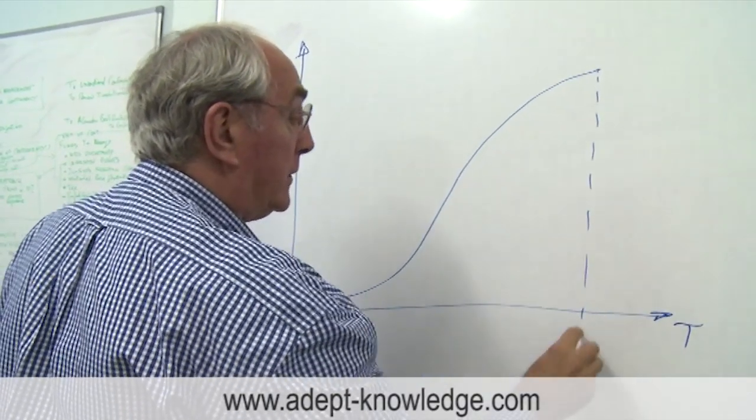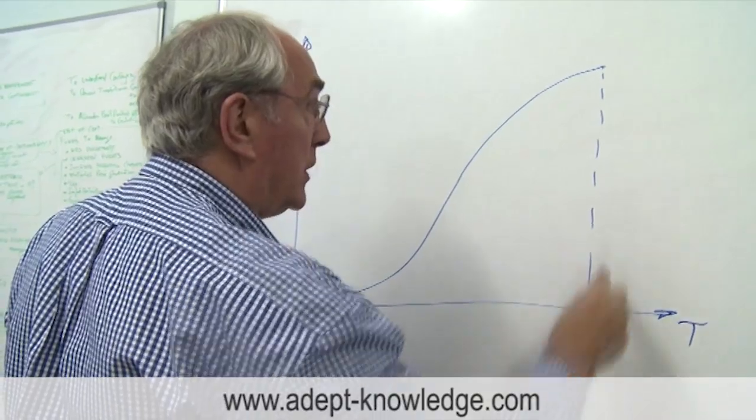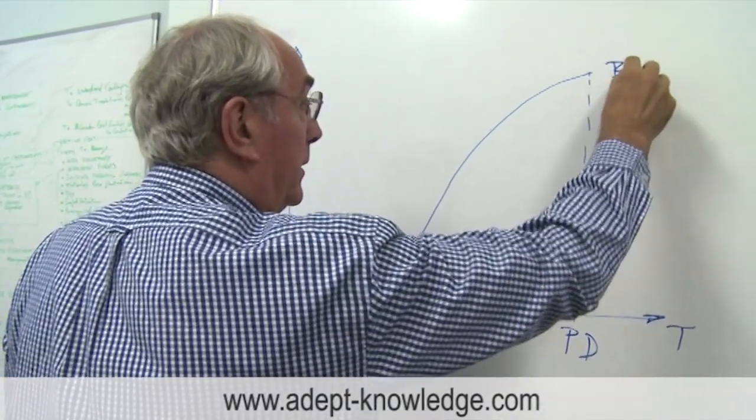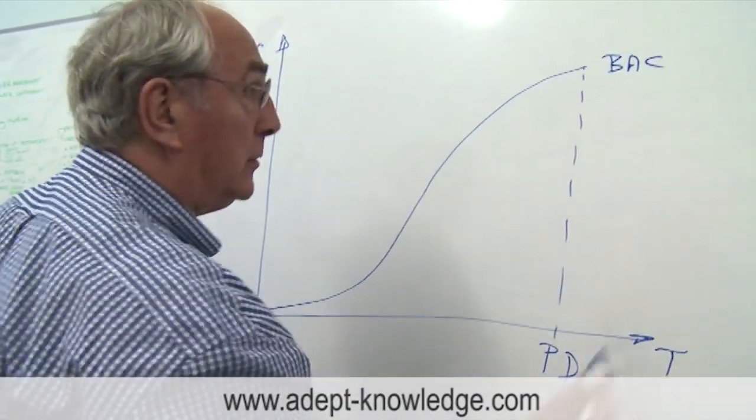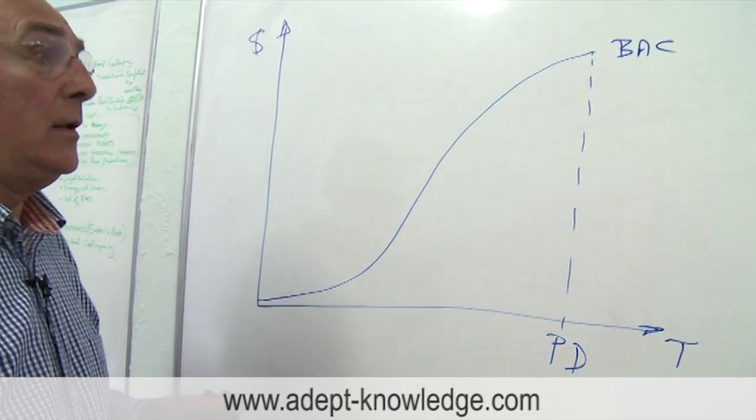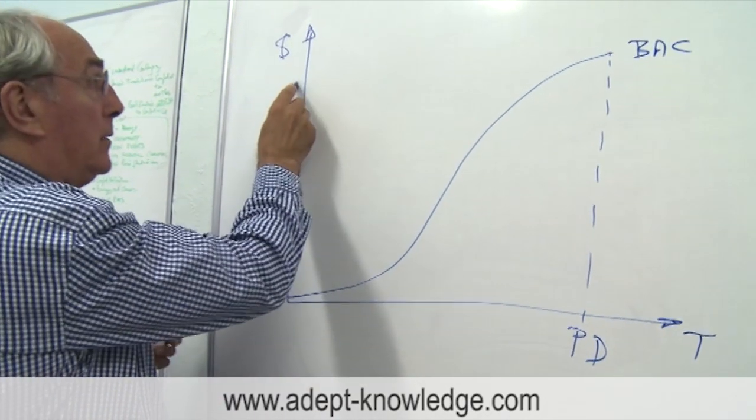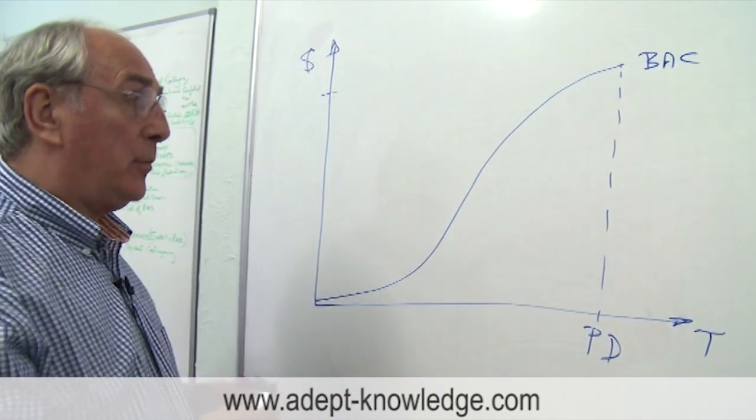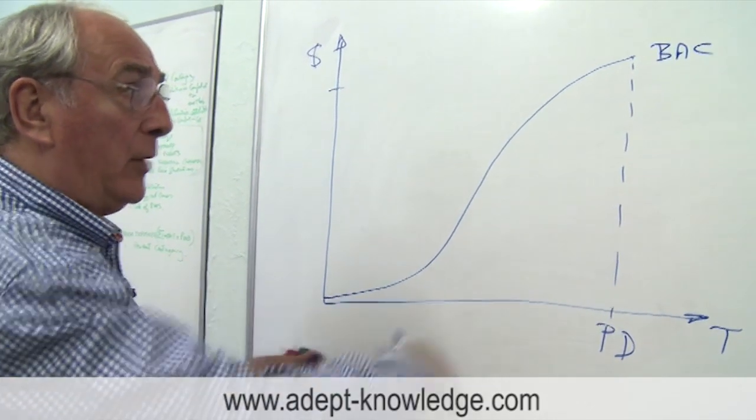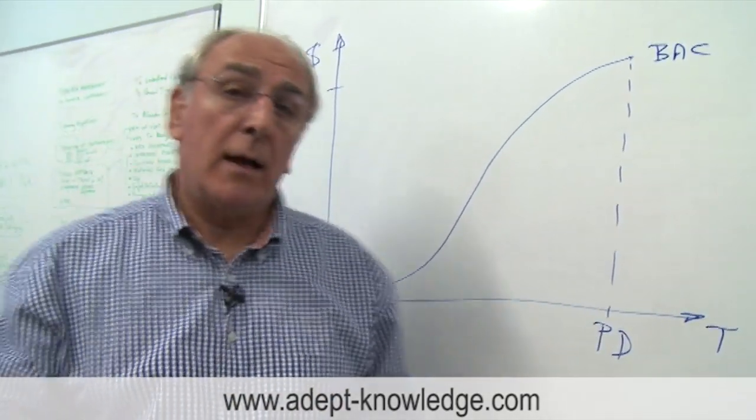And that's telling us this is the end of the project, the project duration. This is the planned budget at completion. Notice that, BAC. So this is where we see the baseline of the project. We're going to do all the work, we're going to spend all this amount of money over that time.